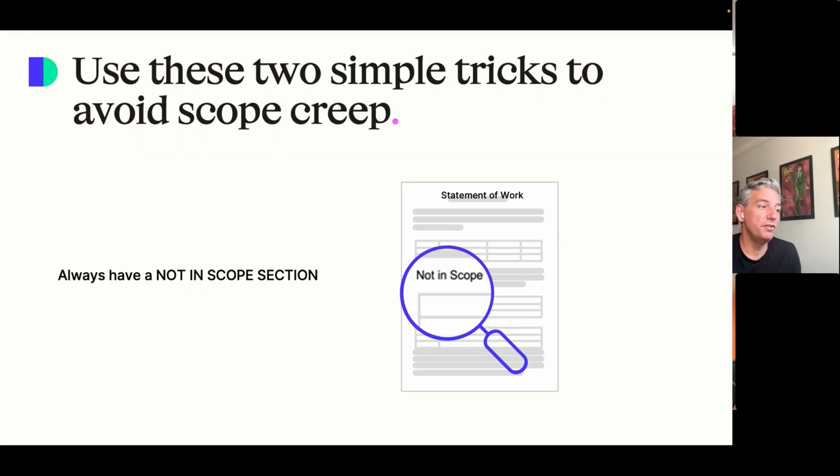You may have heard this story before, but one of our clients is a bank. They'd commissioned a consultancy to write a report on the state of the market, and the provider assumed that it was a UK market, but the bank assumed that it was a worldwide market, which led to a dispute. Unfortunately, it wasn't specified in the statement of work. It's this kind of situation where a discussion around scope and exclusions and what would be out of scope would have actually helped. By trying to work out what was in scope, but also out of scope, they would have figured out this misunderstanding and solved it before the work started.